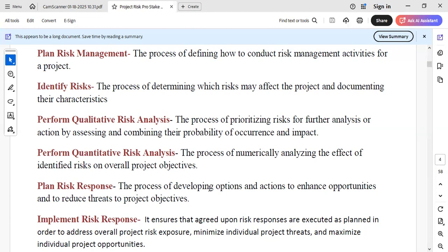But when we move into the perform quantitative risk analysis, we want to rank the risk over the project objectives. And then you see some risk coming higher than some risk. Now you can see that some risk may likely take 10% of your total investment if they may occur.